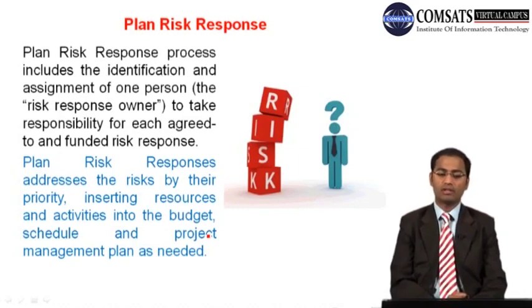Plan risk response process includes the identification and assignment of one person, and that is called the risk response owner or risk owner, to take responsibility for each agreed to and funded risk response. So one person is actually assigned for this very particular risk. And then plan risk responses addresses the risk by their priority, inserting resources and activities into the budget, schedule